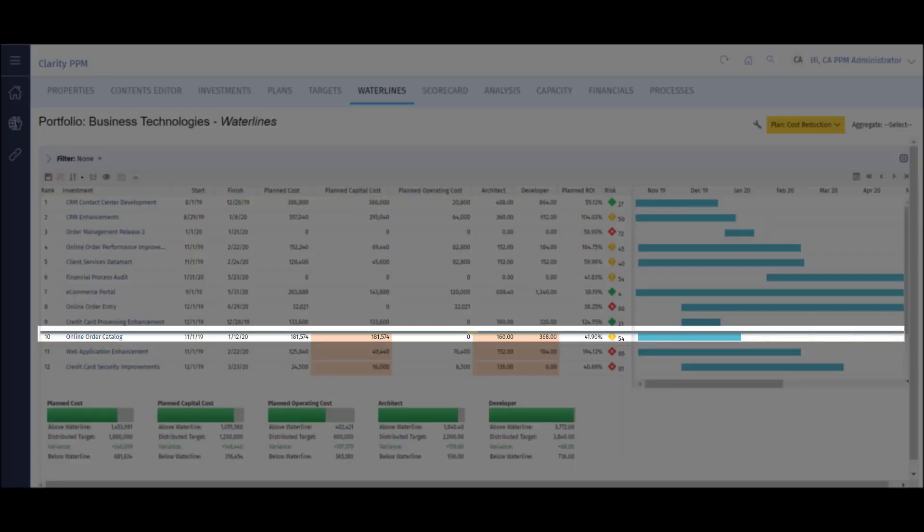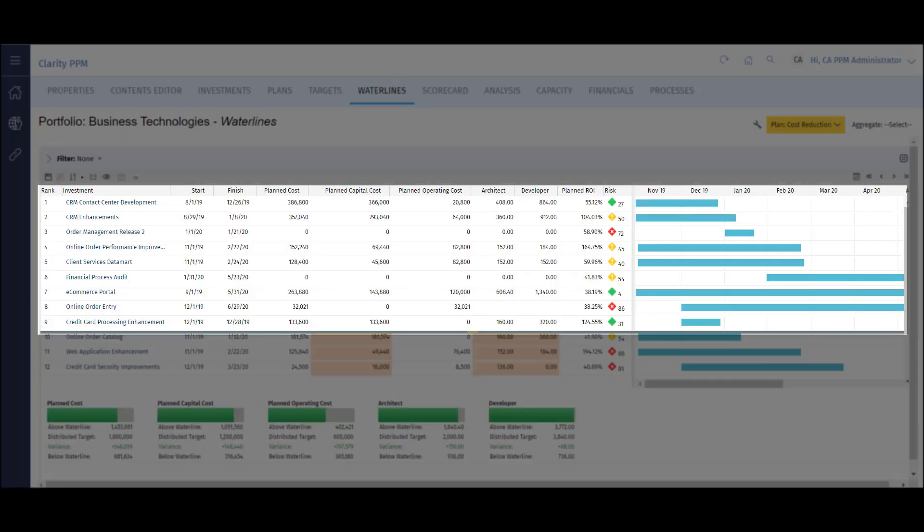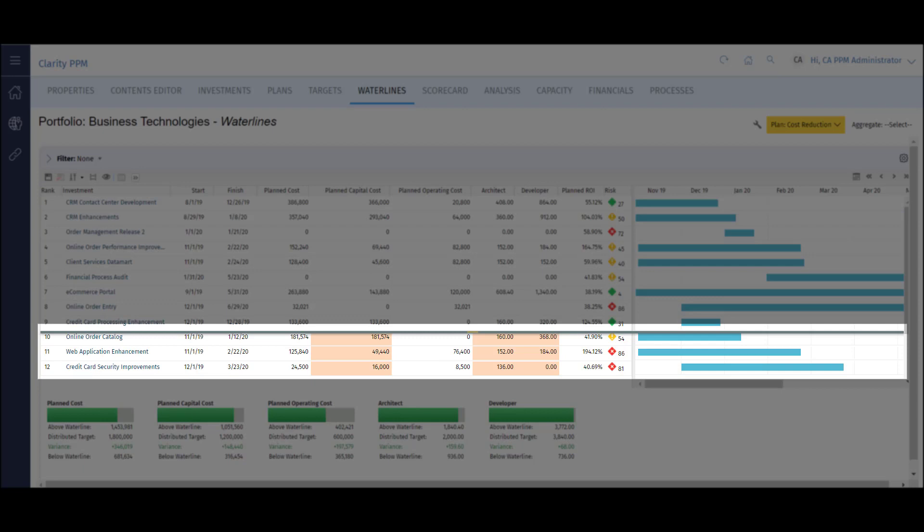The line in the middle of the screen is called a waterline. This line separates my planned work from my wish list. Everything above the waterline are projects we have the budget, people, and time to work on, while everything below the waterline are projects we would like to do, but we are either short on budget, people, or time.